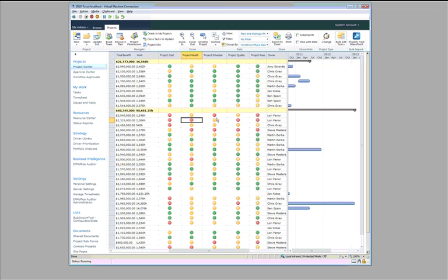Or I could, and I'm going to pick my example here of the project schedule field here, actually make this objective KPI. All this is very, very simply doing is it's looking at the end date for my plan, and it's comparing it to the baseline end date, and if I've slipped, it displays a red indicator, or an amber indicator if I'm in tolerance. Similarly for cost, comparing against baseline cost. So really this is our live management by exception, tracking your projects. Not as live as we get our project managers to keep their plans up to date.